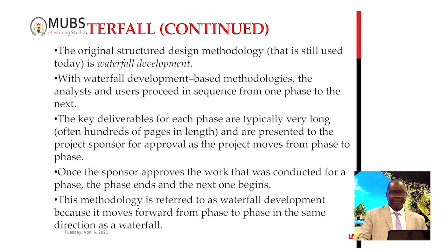It doesn't reverse. It doesn't go backwards. It flows in one direction. That's why we call this waterfall model. So the implication is, after planning phase, once you have completed that, you move to analysis, you don't go back to planning.